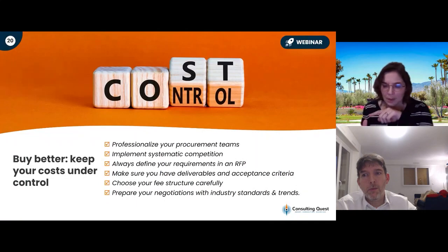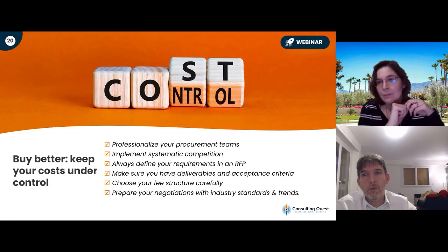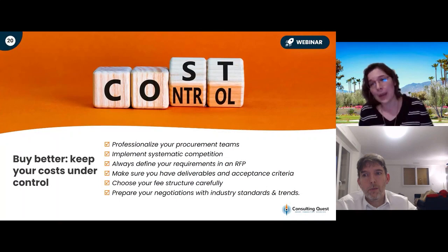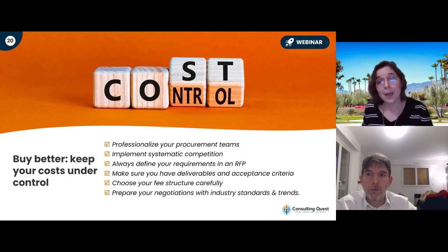One is a project where they used daily fees, without a flat fee, just a daily fee and a number of hours, but they did not define any soft or hard cap. And worse than that, they did not trace the change in the scope. At the end of the day, the consultant worked much more than expected, and the client wanted to just go back to the first estimation. Yeah. And that was a huge conflict.